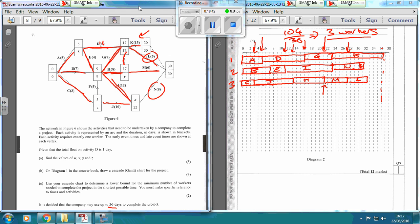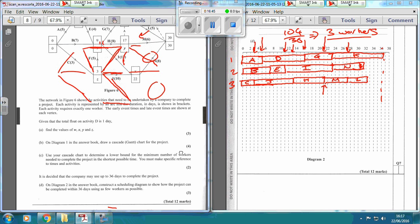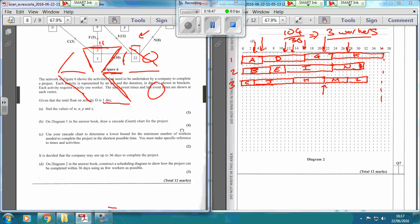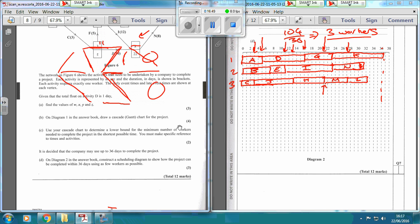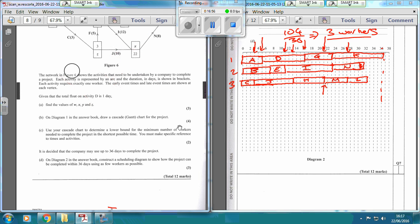And that's how you do that question - not an easy question. The key thing is, even if you didn't do well on this question, you're going to get one mark for finding the minimum number of workers by adding up all the durations - 10, 8, 12, 5, 3, and all the others - then dividing by 36. Thank you very much, and I hope you did alright on that question.